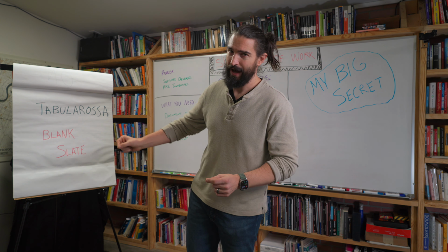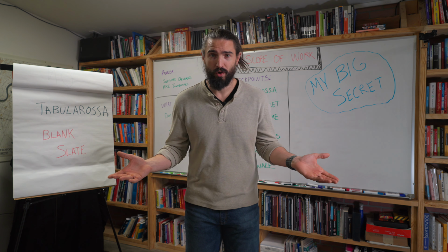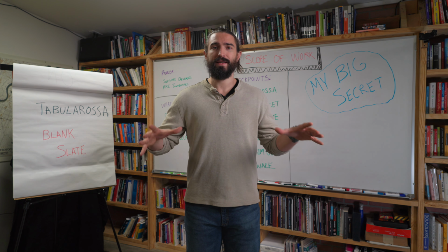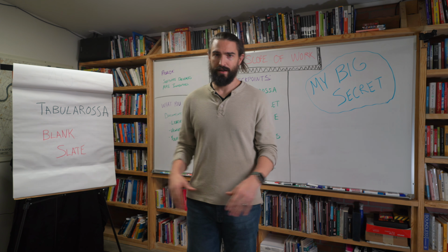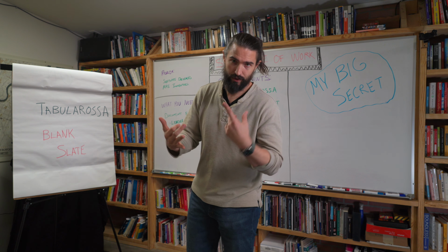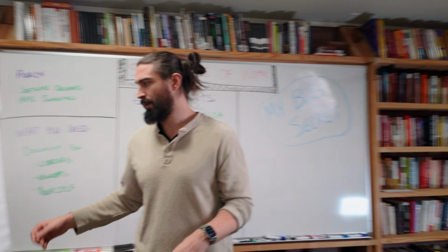So in phase 1 or checkpoint 1, we're going to do all the demo, we're going to do all the clean out, we're going to do any framing that's necessary if you're changing out the layouts, we're going to do any structural work that's necessary to make this house ready for everything else. You'd also do the roof in tabula rasa. Basically, you want to make sure that you get through any of the bleeding, anything that is causing more damage to possibly happen to your house. So structural work, the roof, making sure you stop the water.